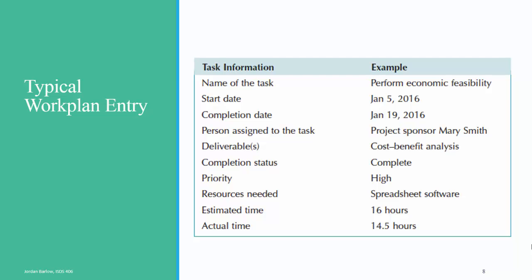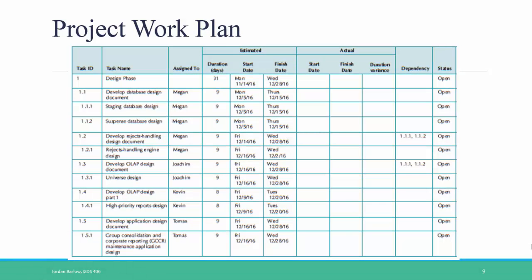A typical entry in a project work plan includes the name of the task, start and finish dates, who is assigned to the task, any deliverables associated with it, whether the task has been completed, its priority, any resources needed, and estimated and actual time spent on it. When completed, a project work plan looks something like this — each task is listed on a row of a spreadsheet, with those characteristics listed across the various columns. Project management software is the best tool to use, and a project work plan like this can be created very easily using Microsoft Project. However, for your homework this week, you can use Excel or Word.